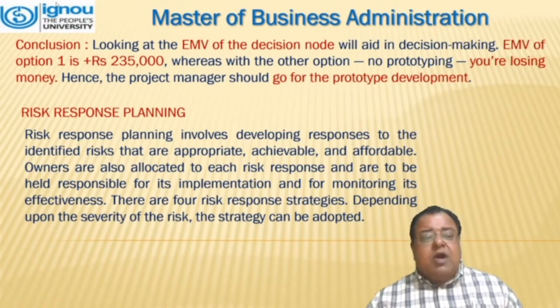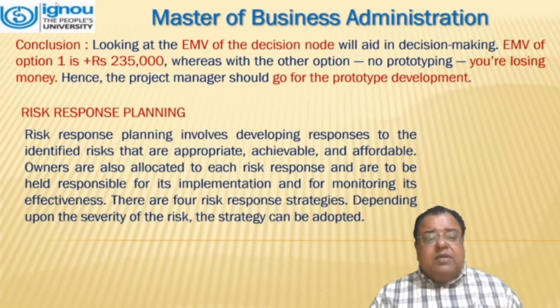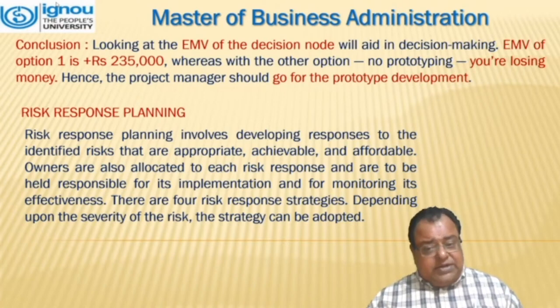Moving further, we talk about risk response planning. Risk response planning involves developing responses to the identified risks that are appropriate, achievable, and affordable. Owners are also allocated to each risk response and are held responsible for its implementation and for monitoring its effectiveness. There are 4 risk response strategies. Depending upon the severity of the risk, the strategy can be adopted.